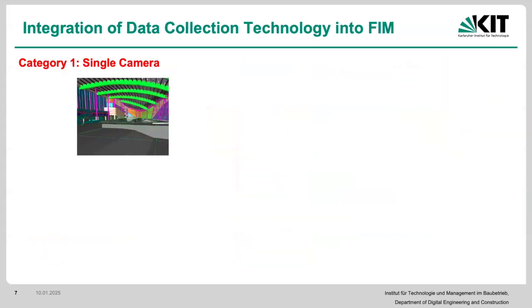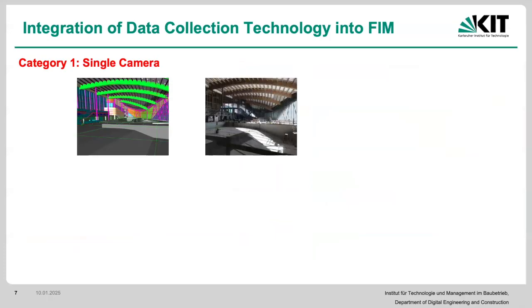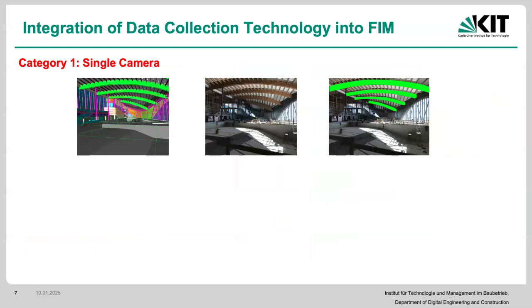So we go into how we are going to be collecting some visual data and information, starting with a single camera. So you have a single camera and you have the construction project. Let's say we want to extract whether these beams on top are going to have some correspondences here. Then we have to superimpose these together, do some image processing, and then extract and identify whether those pixels actually belong to a beam or not, and then from that make a judgment and decision there. And the goal here is to make it as automatic as possible. Again, it's not simple in absolutely every problem, but in some problems where we have a lower amount of construction error, we have that opportunity, okay?